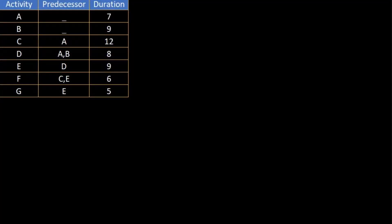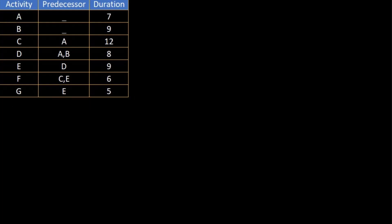In this example we have a project box that has activities from A to G. A and B are independent activities which do not have any predecessors, and C, D, E, F, G start after the completion of one or two activities. They have different durations as well. Firstly we will make a simple diagram, after which we can make a detailed diagram. A and B are the starting activities since they do not have any predecessors.